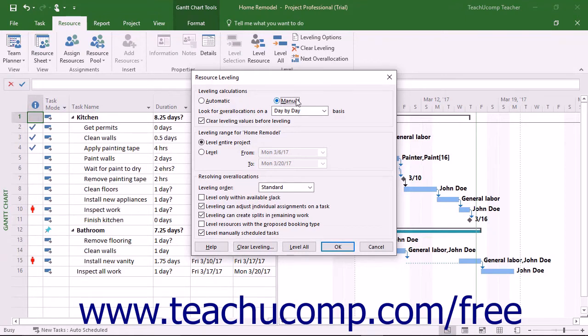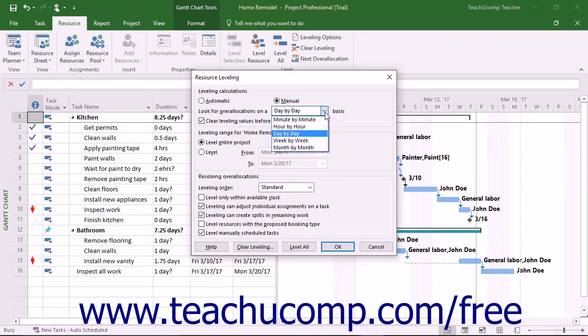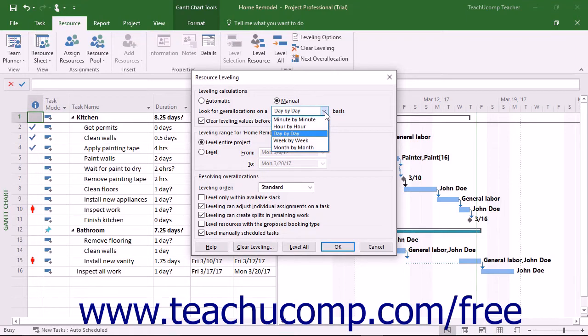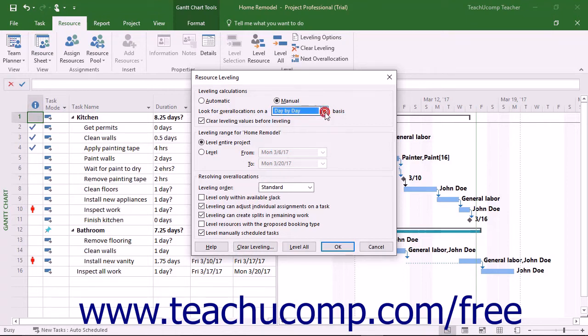Next, use the Look for Overallocations on a drop-down to select the basis used for resource overallocation examination. Choosing a level of inspection that is finer than a day-by-day basis may result in many unnecessary adjustments to the work schedule. Use care if selecting a level of inspection finer than a day-by-day basis.